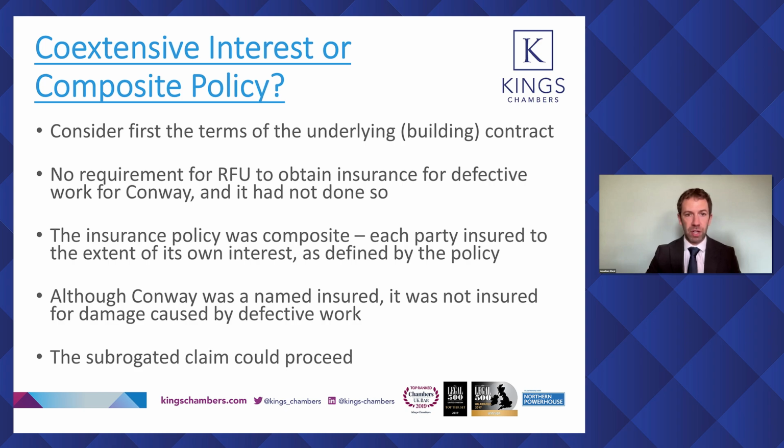Well, as we've seen, we have to go back to the building contract to work out the extent of each party's interest in the insurance and the matters for which insurance was taken out. In practical terms, usually one party will be contractually responsible for procuring the insurance policy in joint names, and the policy is likely to be in standard terms or mostly standard terms, and probably won't spell out the extent of each party's interest other than noting their name in the schedule. So the court will, on that basis, have to work out the extent to which each party is covered by the various provisions of the policy.